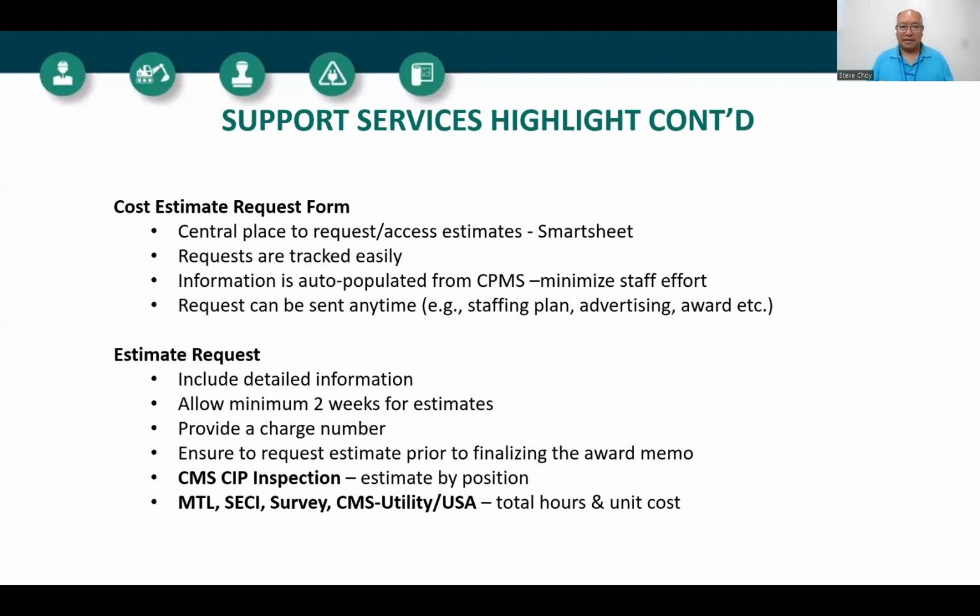And all of us are going to ask for a charge number, whether it be to work on the estimate request itself, if it's a large project, or a charge number that's phase appropriate as we do the work later in the year. And again, the way the estimates are done, CMS CIP, the construction inspectors, they're going to provide you estimates by position by the FTEs. Everyone else in engineering services, the lab, SECI surveys, and the B group, we're going to give you estimates based on hours and the cost for those services.